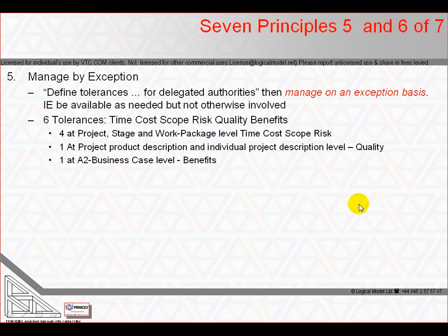Fourth, management by exception imposes an escalation process when an actual or possible variation is beyond a tolerance limit, and so triggers the escalation of an exception to the next higher level of management for a decision on how to respond to the tolerance threat.